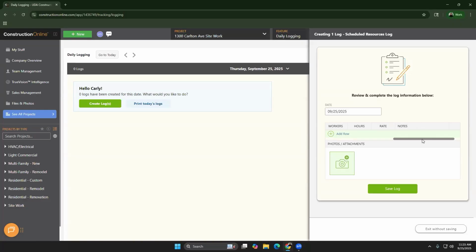I cannot tell you, Ivy, how many clients I've had that have personally come to me and said that they have trouble with their subcontractors sometimes not showing up on certain days. This gives you a way to document it. If you ever needed to go pull that log that shows that people are continuously not showing up, or continuously having problems completing the work in the assigned time, it allows you to have that documentation on file in case that job ever goes to litigation. So, a really powerful tool that you have here specifically with the daily logging integration.